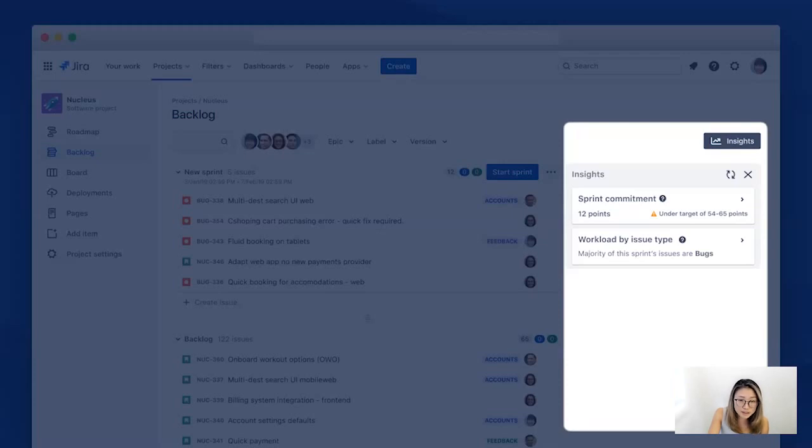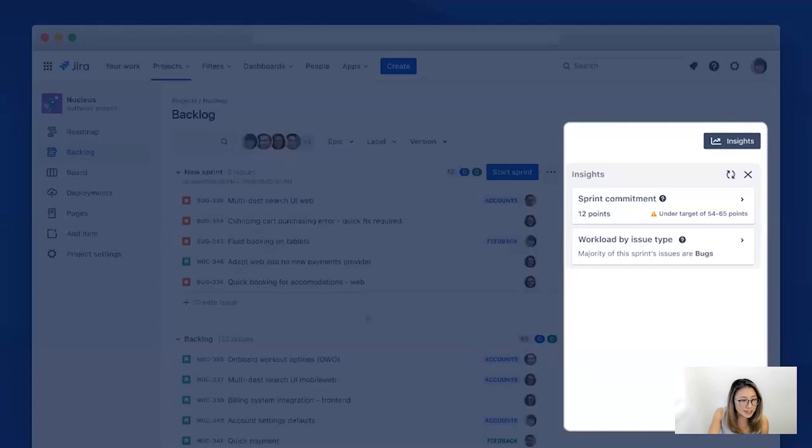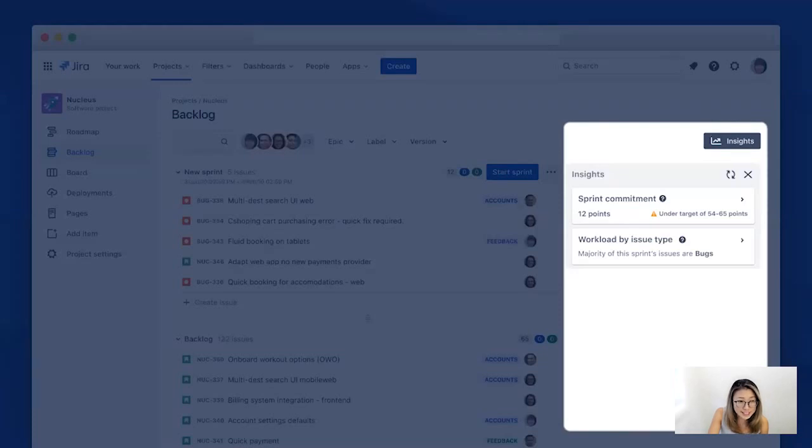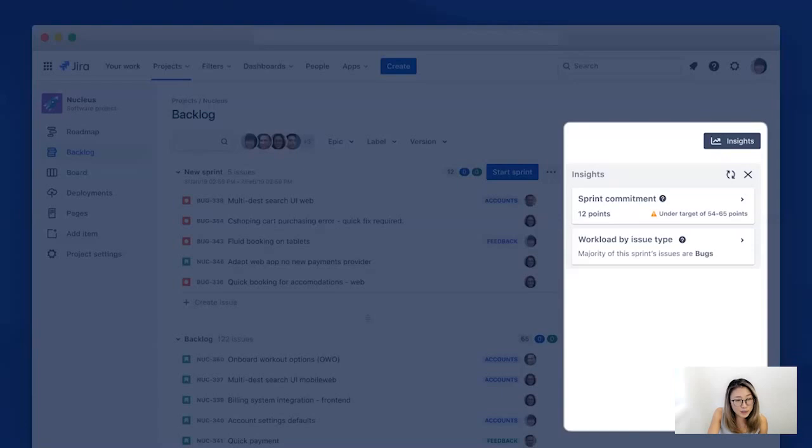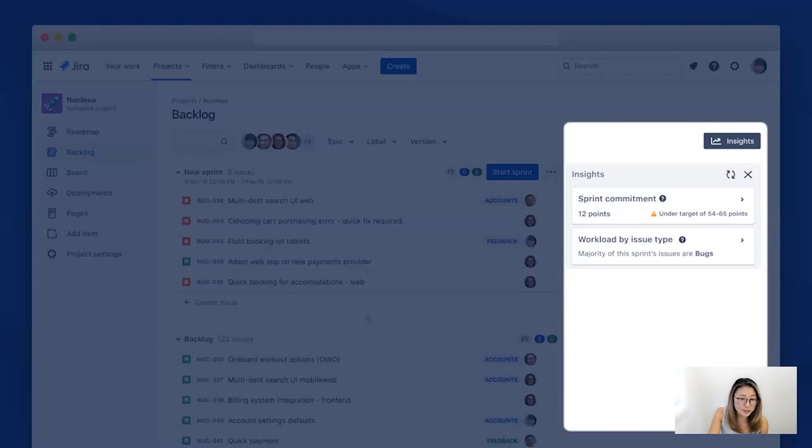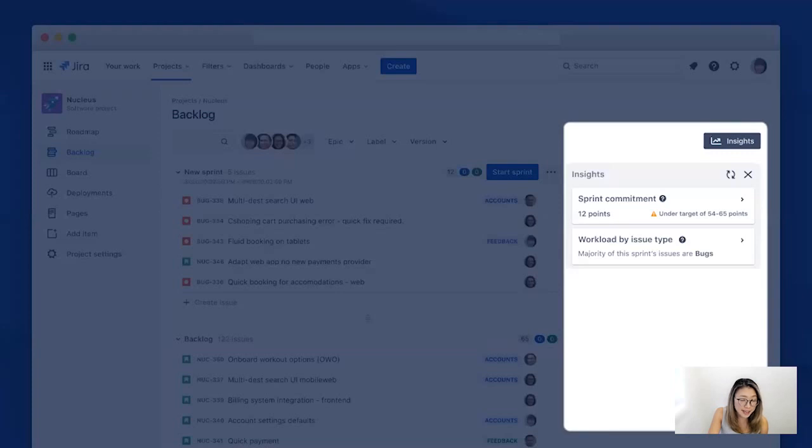And the total amount in the sprint is below the target of the range of 54 to 65 points. And on the second card, you see that it displays the workload by different issue types in the sprint. And it says that the majority of the sprint's issues are bugs, and you can see that on the backlog as well. And as you can tell by now, Insights in the backlog is designed to help you plan your sprint by recommending how much should be added to the sprint and also displaying the different types of work that's currently added to the sprint. So let's take a closer look at how this can be used in action.